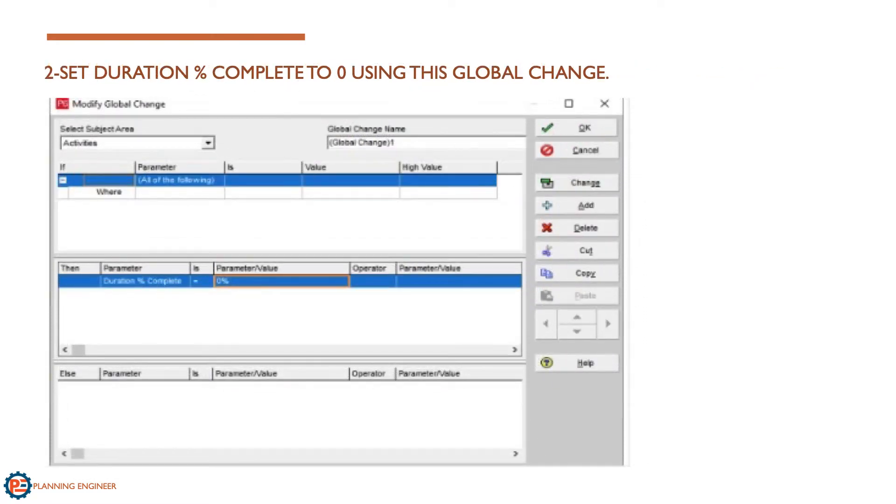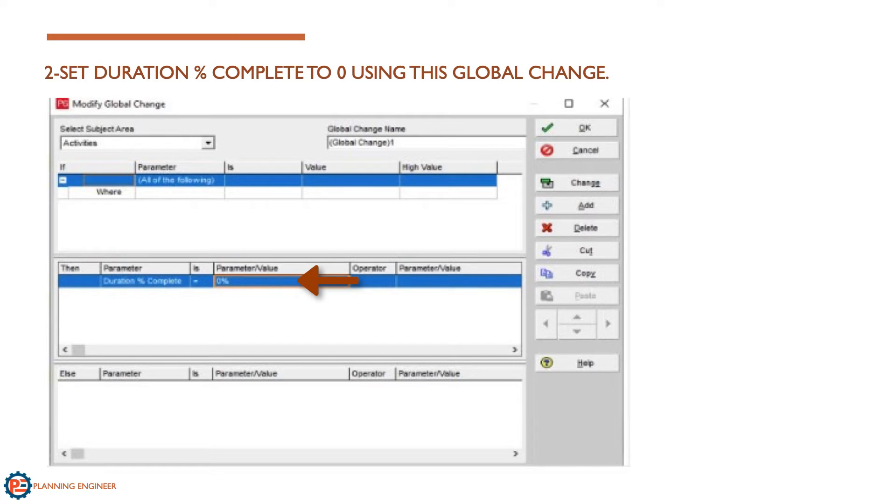The second step is to set the duration percentage completed to zero. We need to remove all the actuals percentages from the time schedule activities. We can do it by making the duration percentage completed equal to zero.